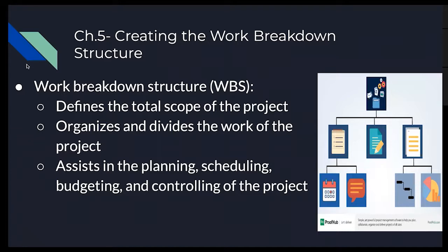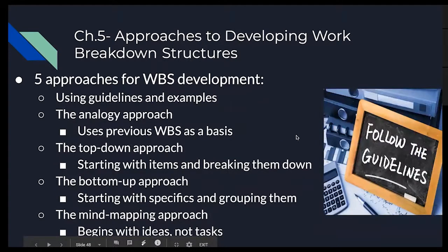It's an effective project management tool that all projects need to use. Now, some approaches to developing work breakdown structures: we have using guidelines and examples, pretty self-explanatory, using a set of guidelines to develop your work breakdown structure. The analogy approach, you're using a previous successful work breakdown structure as a basis for what you should base your new work breakdown structure on.